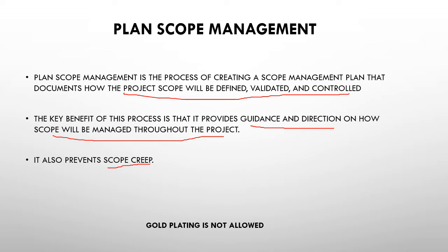And in addition to it, as per the PMI guidelines, guys, gold plating is not at all allowed in project management. What is gold plating? Whenever a project manager intentionally adds features to the product scope which are not in the project scope statement, that is what you call gold plating. So that is not at all allowed. Okay.